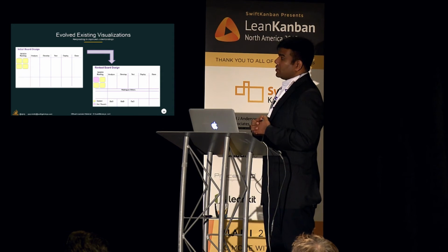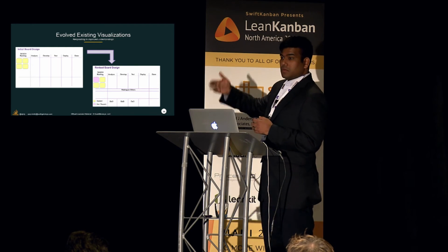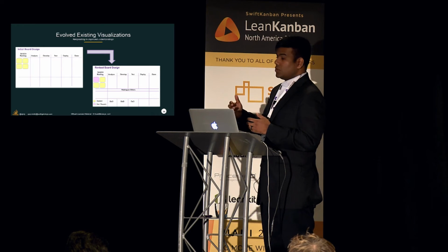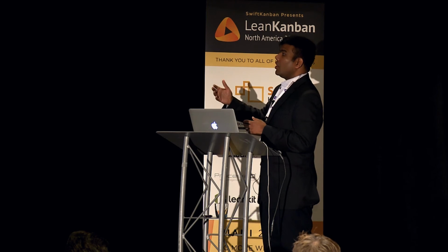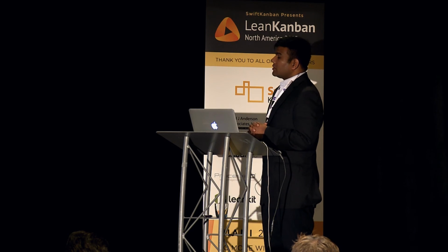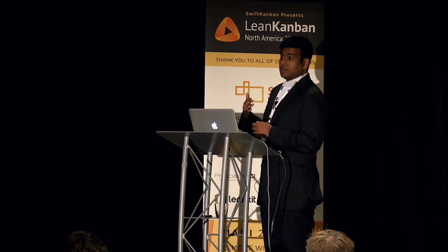Also what happened here, you'll see, is that the definition of done broke up into multiple stages. They're not quite gates, but they captured the specific value being added at those specific value-adding columns or steps. That definitely added value, and it gave them a chance to fail early, right? So that was an important thing.